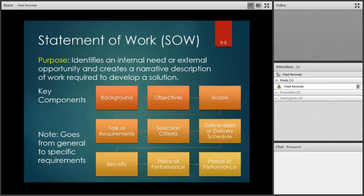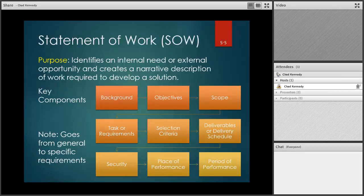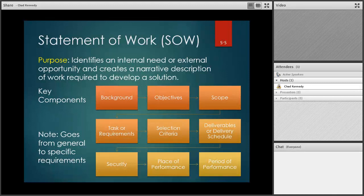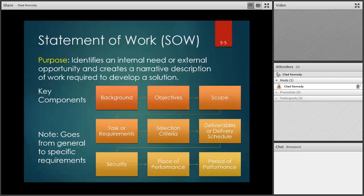There may also be security requirements to consider. For example, healthcare IT projects must comply with HIPAA data security requirements, and DOD projects may require higher security clearances and background checks. Place of performance specifies where the work will be done — on a contractor site, government site, or on-site for the company. Period of performance defines how long we have to complete the project. Those nine components outline the full statement of work.